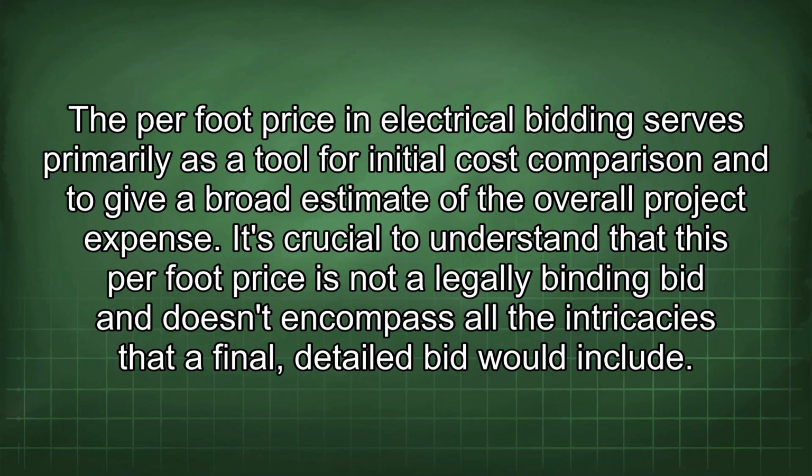Per foot price in electrical bidding serves primarily as a tool for initial cost comparison and to give a broad estimate of the overall project expense. It's crucial to understand that this per foot price is not a legally binding bid and doesn't encompass all the intricacies that a final, detailed bid would include.